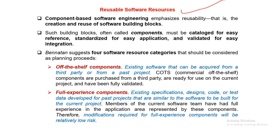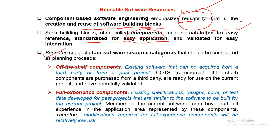For reusable software resources, component-based software engineering emphasizes reusability. There are four software resource categories to consider. First, off-the-shelf components — existing software that can be acquired from a third party or from past projects. For example, if you want to develop a Java-based project, you need Eclipse or NetBeans. You are not going to develop Eclipse or NetBeans yourself — you are going to use those off-the-shelf components.